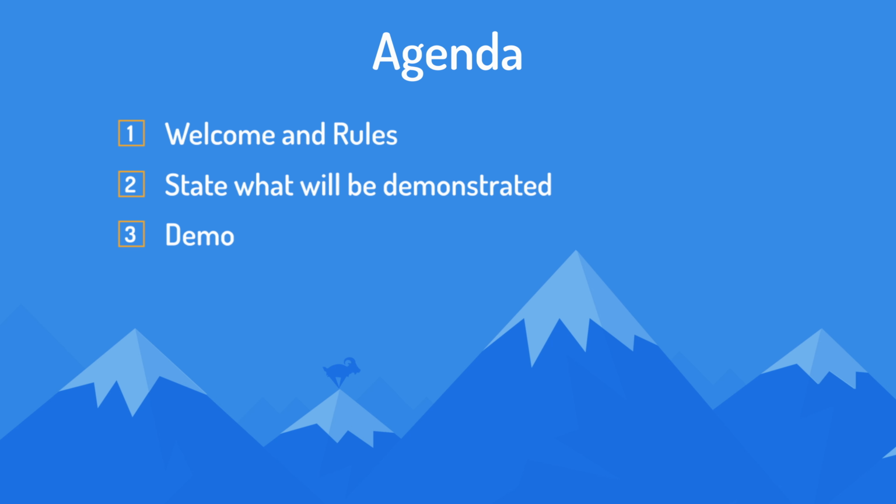The fourth item on the agenda is to discuss any problems or opportunities that arose during the sprint. If stakeholders were slow to respond to emails during the sprint, now is the time to let them know how that affected the team. If a team member was out sick for a week and that might affect the overall delivery, discuss it. Similarly, if team members notice any opportunities, this is a good time to discuss them. Perhaps a new tool the team is trying could shorten the schedule.